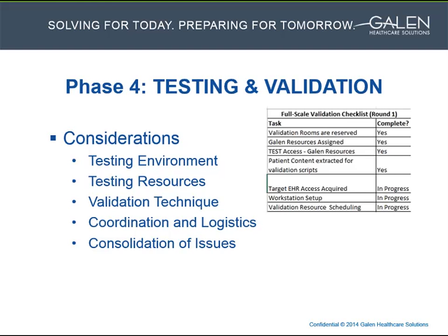Depending on who will be doing the testing, scheduling the testers to validate can take a lot of preparation. As mentioned before, resources and end users usually have limited time away from their regular jobs, so validation schedules should be worked out ahead of time. If end users are involved, it may also mean finding coverage for them at the clinic or the hospital.